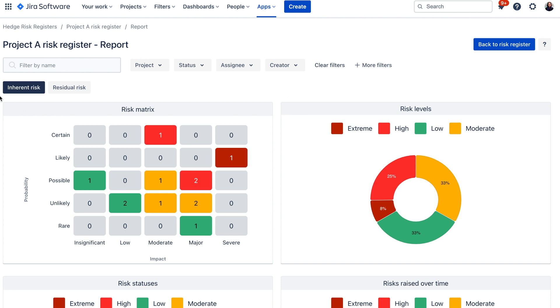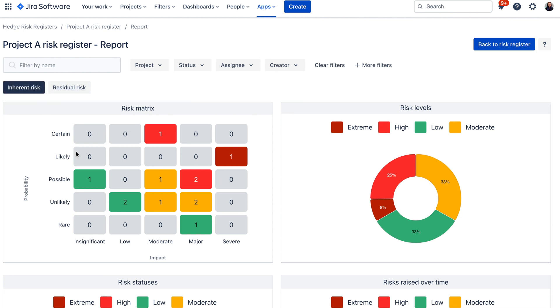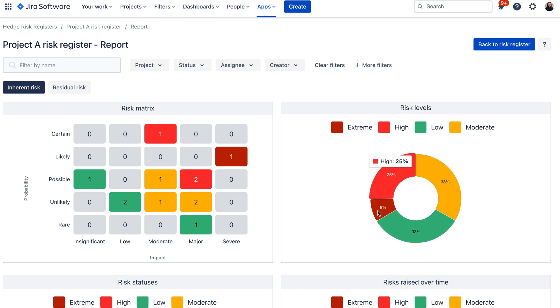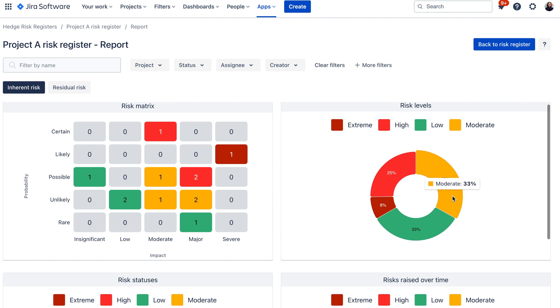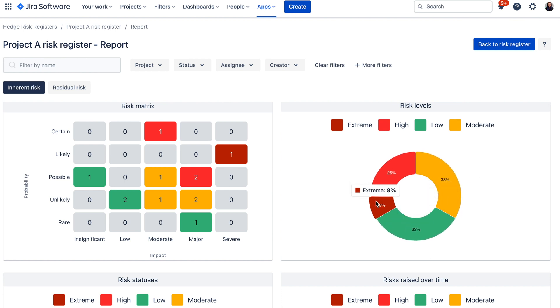So here you can see there are two different reports, one for inherent risk and one for residual risk. So for inherent risk you have this risk matrix over here where you can see the distribution of your risks. You also have a risk levels distribution in this section in a simple pie chart. So you know for example that you have a lot of moderate and low risks and you don't have as many extreme risks.